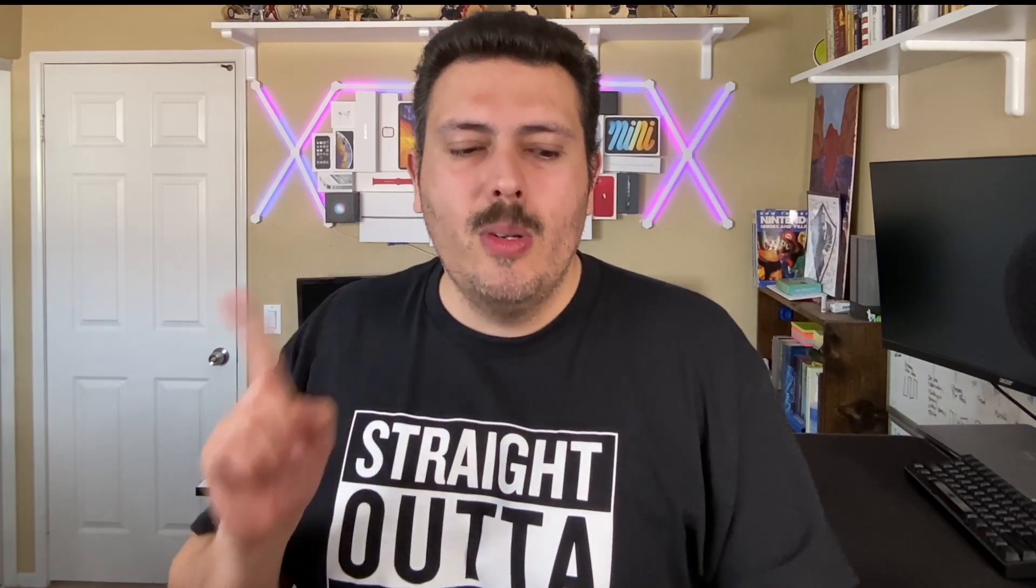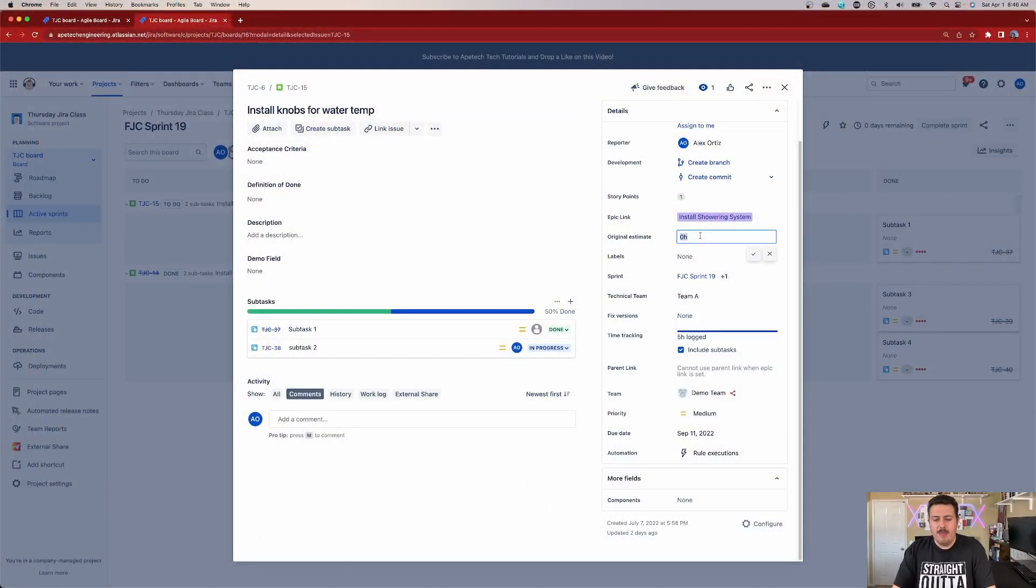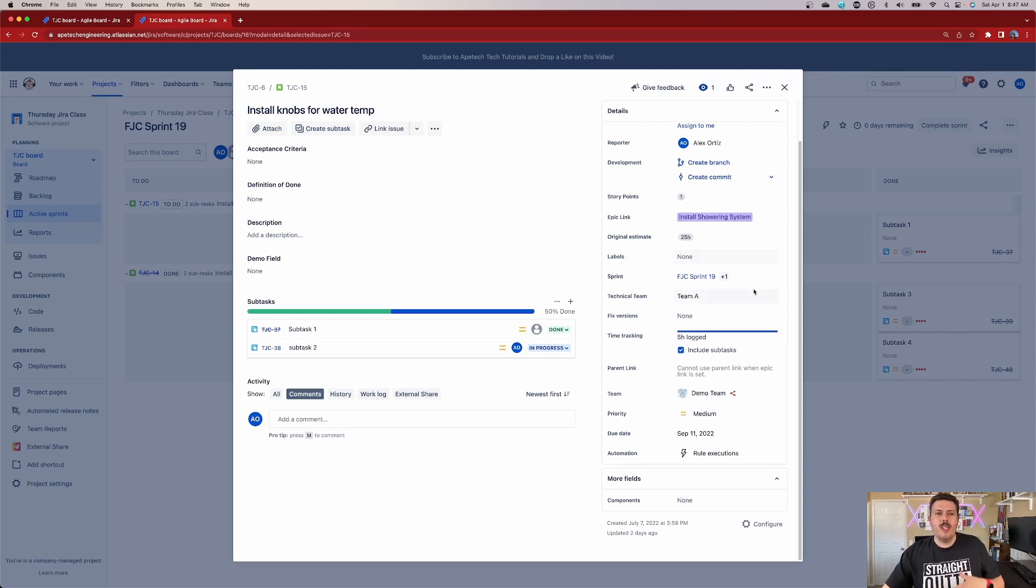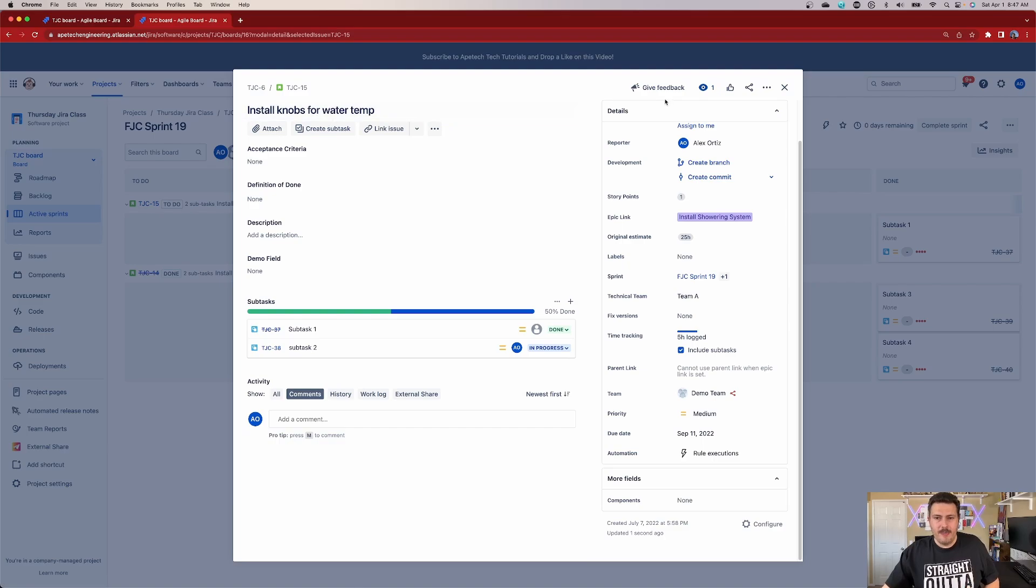It's a wild guess of an estimated one, nonetheless, but of how much effort relative to complexity an issue is going to take versus the original estimate. It's more like bare bones, it's very concrete, it's very just brass tacks. How many hours are we talking here? How much is it going to cost me? So when you go to fill out the original estimate, that's what you want to keep in mind. So for this example, I'm going to put, I'm just going to put 25 hours. So that is my original estimate for this installing knobs for water temp story.